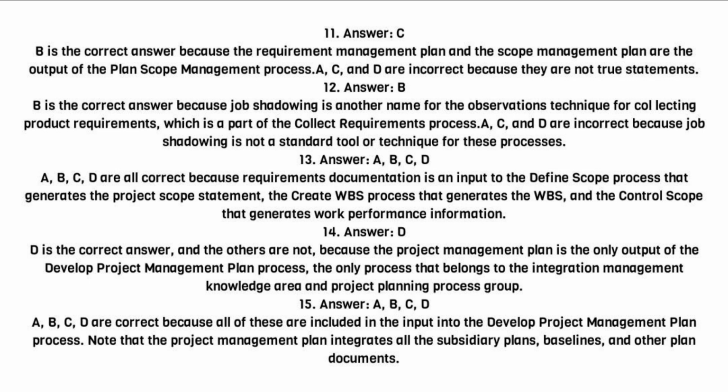14. Answer. D. D is the correct answer, and the others are not, because the project management plan is the only output of the develop project management plan process, the only process that belongs to the integration management knowledge area and project planning process group.